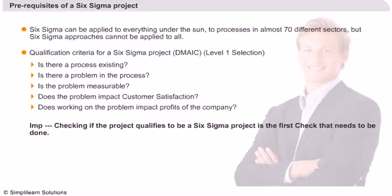Remember, this is the Level 1 check — the first check you do to know if a project qualifies as a Six Sigma project. It also asks whether working on the problem impacts the profits of the company.